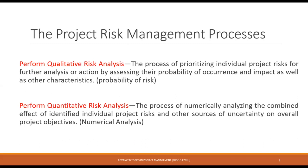Performing qualitative risk analysis involves identifying threats or opportunities. If the risk is positive, it is an opportunity; if the risk is negative, it is a threat. The analysis considers how likely they are to happen and the potential impact if they do. Results are typically shown using a probability or impact ranking matrix, and this type of analysis also categorizes risk either by source or effect.